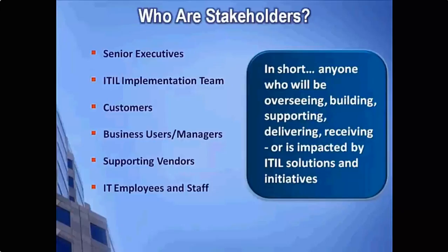I constantly interview many different ITIL implementation managers that have worked on ITIL implementation programs, and I ask this question specifically in terms of how much effort they feel they spend as a project and as a program on stakeholder management and something we'll talk about later, which is organizational change. And typically the answer comes anywhere from 70 to 80% of that effort. So this is a very key area.